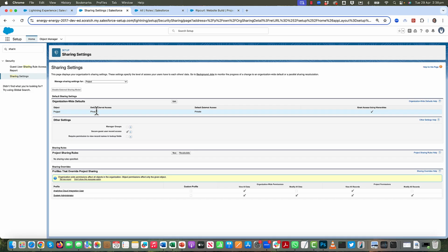Now, very quickly, creating a project plan, you can have multiple records like the project, milestones, phases, actions, checklists, risks, issues, and so on. So some of those will be owned by different resources. So ultimately, if they've been assigned ownership on something on the project, we want to give them access to the entire project plan. Now, it depends on what level of access we want to give them. So we can choose to give each person either read or edit access.